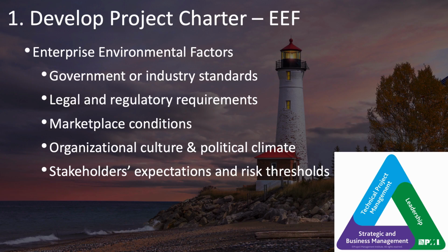MSHA, or Mine Safety and Health Administration, applies to the mining industry. You may also need to follow different regulations such as HIPAA for medical records, and consider PII, or personally identifiable information, and keeping that information secure. Information security limits where data can reside and where work can be done.